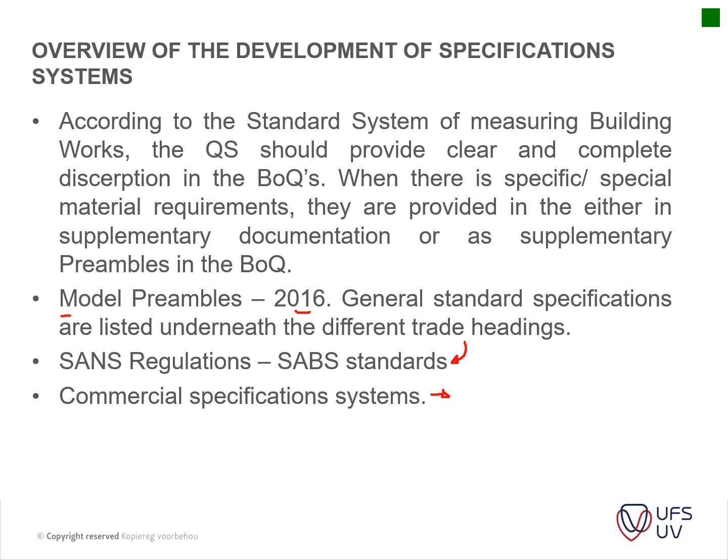Or another example would be, for instance, a specification on paintwork. Dulux have their own application specifications, how it should be applied, the moisture content of the walls should be a certain percentage, and so that specification is then incorporated in your tender document.